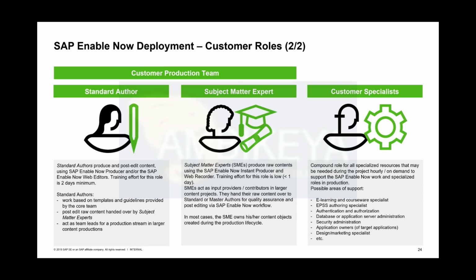At what point do we need to be speaking to the application owners? I would guess that would be right at the very start when we do the preparation phase, or is that during the strategy phase? In the preparation phase, we just announce that it's necessary and explain why, and then the customer has a certain time frame to get those people accessible. Then from the planning so far, it's part of the strategy and configuration phase, and there in the work stream technology and infrastructure, that's basically the only mandatory part of that stream.